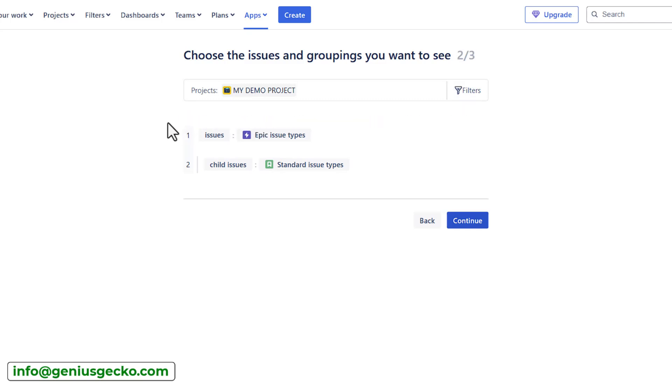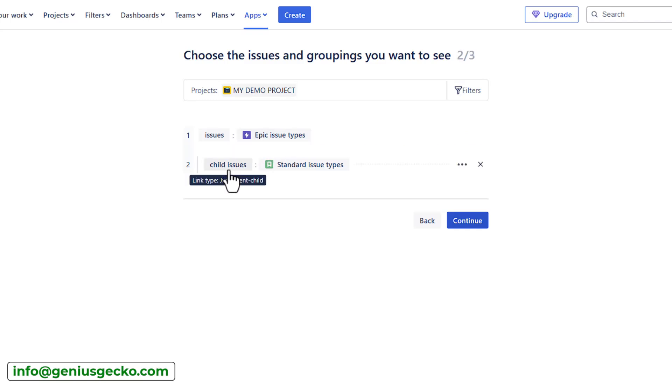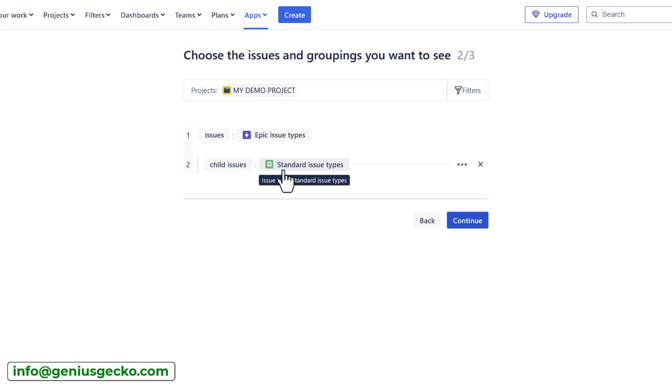In the second part here, you'll have the default hierarchy that Structure will use. By default, it is the issues. On the very top, we will have epic issue type. Below the epic, we will have the child issues. The option selected is standard issue types. If you're familiar with the hierarchy in Jira, in the standard version, that would be the epics, child issues to the epic and just below would be the subtasks. Out of the box, you have three levels within the hierarchy.